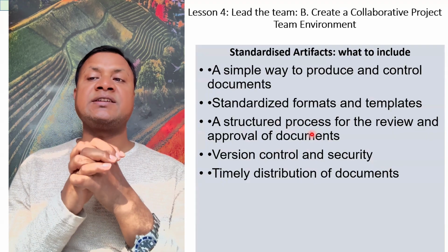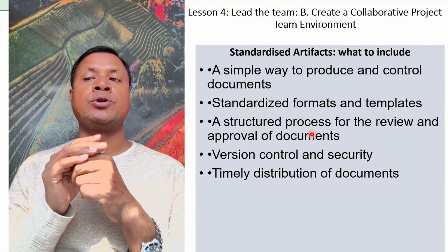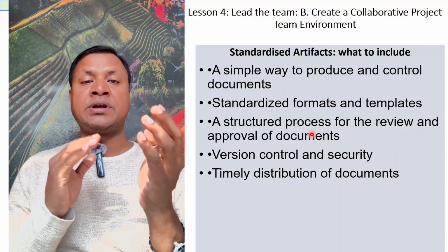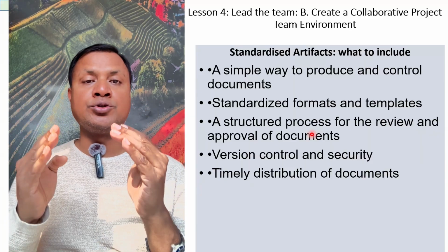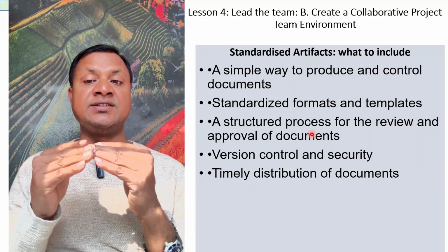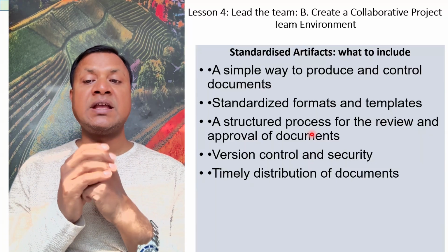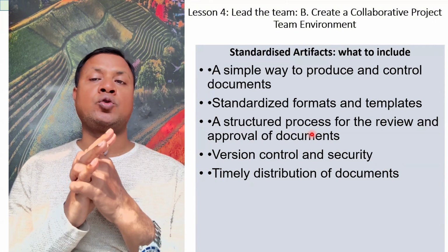So standardized artifacts, what to include in this system? A simple way to produce and control documents, standardized formats and templates so that everyone can understand by seeing the template, and it will be homogeneous, everyone will get it easily. A structured process for the review and approval of documents, version control and security should be there, and timely distribution of documents.